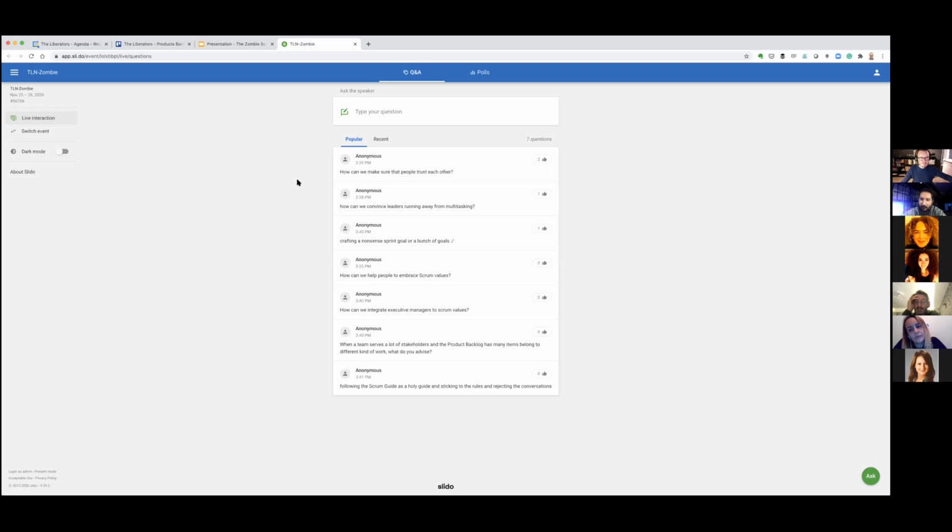It is very obvious that in this situation, it is really hard to craft a sprint goal to serve as a North Star for the team. For the sprint. So when this is the situation, what do you do? Well, for this team, would it help? Because that's what I like about the new Scrum Guide, is that they introduce the product goal. Would they be able, you think, to define a product goal? Or would it mean that they discover that they are not really working on one product? Maybe they need to define the product again, and also the stakeholders again, and also the product goal, etc.